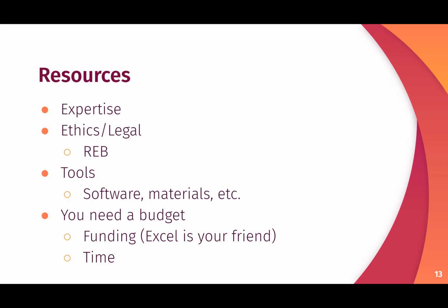And then you need to come up with a budget for two things. Number one is for funding. I say Excel is your friend, and Excel is always your friend when you're having to do anything like that. But thinking about the money that you need, if you need to go look for external funding and things like that. And then also another one for your time. So you need to budget your time to know how much time will be dedicated to each particular task, particularly when we talk about people who have other responsibilities, like we said in the beginning.